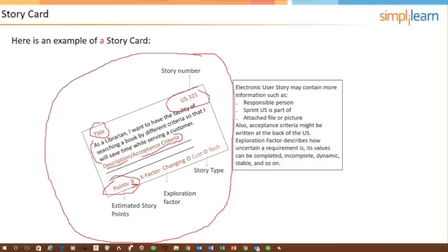It's not listed here, but there's probably going to be a value point assignment. This is where the product owner determines in a relative way the value of the stories. Just like we were doing in planning poker, the product owner might say, well, this story is twice as valuable as this other one, comparing them together. And this is what these value points are, what's used to prioritize the user stories. That's supposed to be a V, as in value points.